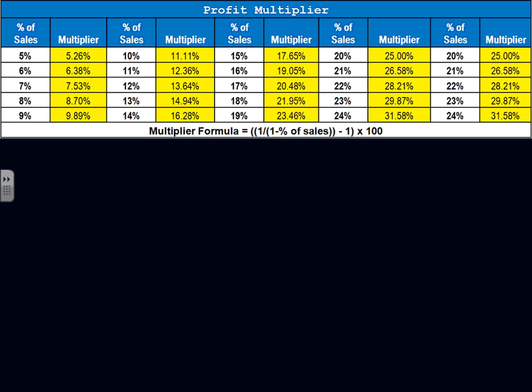So the percentage of sale is a percentage to the overall selling price of the project. That's your 10% profit. The markup is the value equivalent to it that you have to multiply the break even by to get you the 10%. Does it make sense? The 10% versus the multiplier. So it's really straightforward. When you do your analysis, you're going to multiply it by these values.